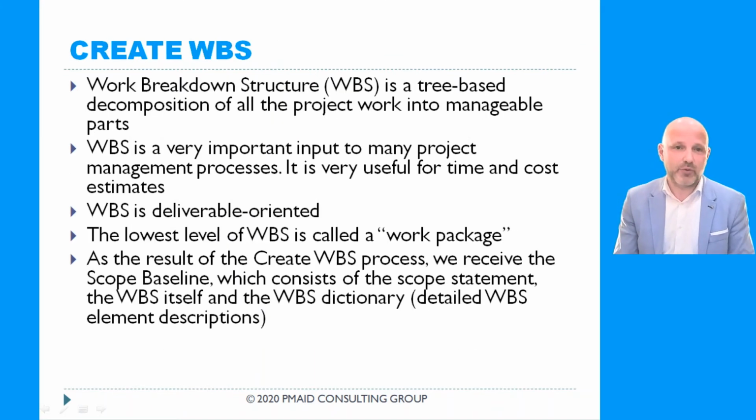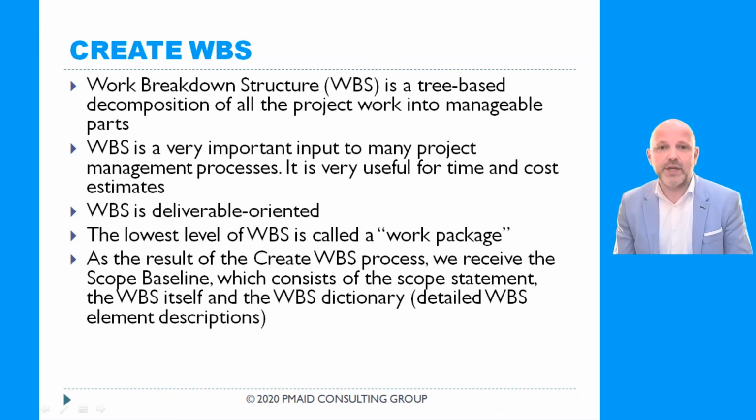Create WBS process. Work breakdown structure, or WBS, is a tree-based decomposition of all the project work into manageable parts. WBS is a very important input to many project management processes. We use it when we plan our schedule, we use it when we plan our budget, we use it when we try to identify our risks.